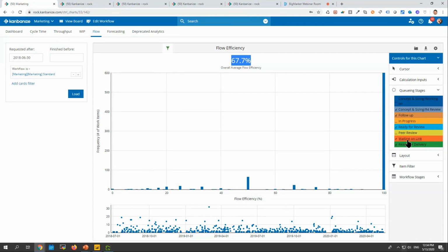So if you want to be 100% flow efficient, this would mean when a work item is waiting on somebody to pay attention to it, this somebody has to stop immediately what they're doing and pay attention to the work that's waiting, which is good for the flow efficiency of this waiting item, but it's bad because it leads to a context switch for this person, and then it will ultimately harm your overall process. So we can't say that flow efficiency going up is always good. It's likely a good thing, but it really matters how you achieve it.